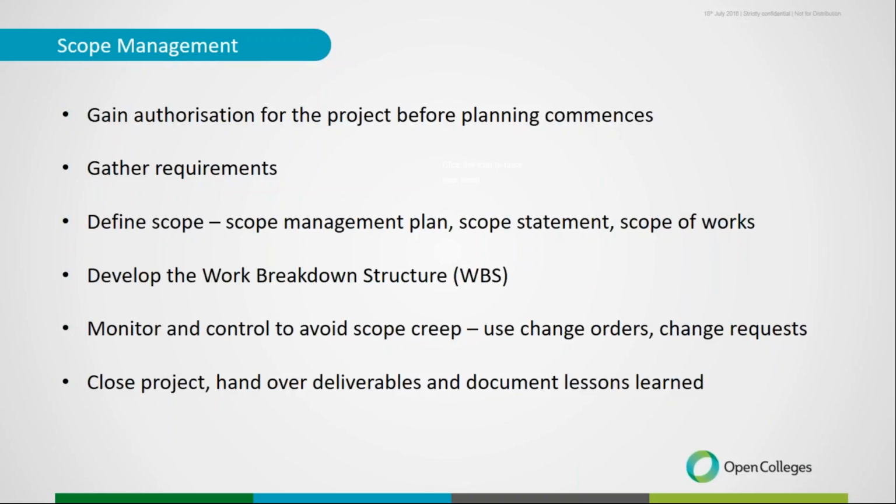So generally there's an approved starting point, and that becomes the baseline that I mentioned before, but it can change. Budgets will change, schedules can change, scope can change, quality requirements can change, but there's a starting point that's agreed on, and then any changes that happen after that, if they're put through the change process, then it's approved, and then things get updated and added and budgets get expanded, but it's done in a controlled manner. So I hope that kind of answers your question.